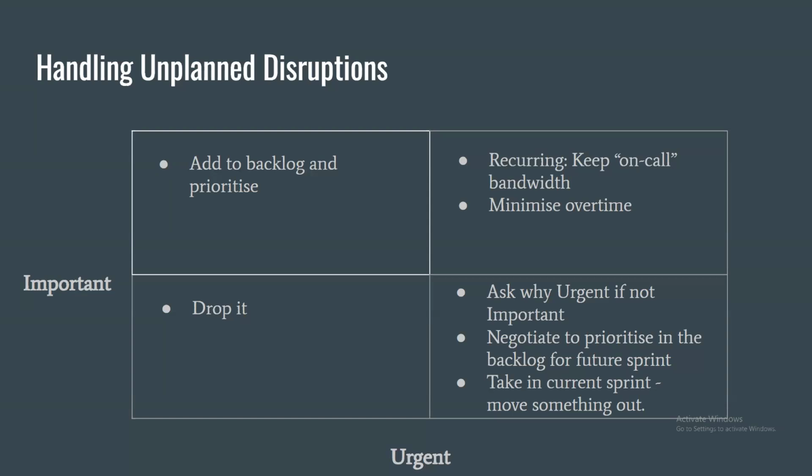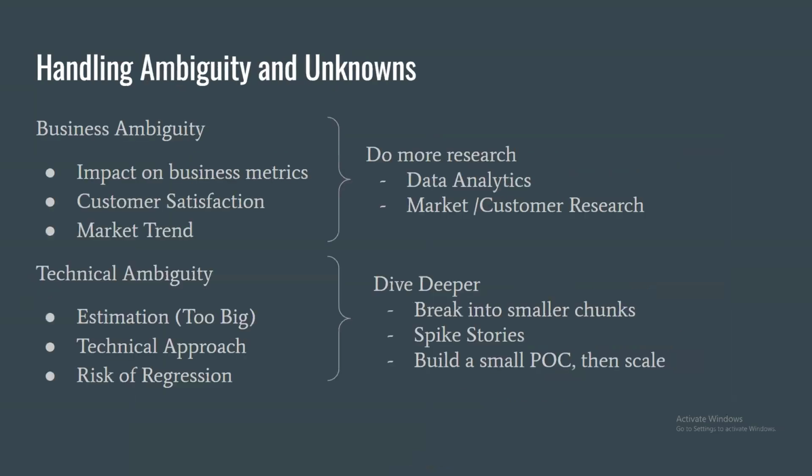I heard from my leaders that no change should be allowed without a value. So there should be a value or an outcome. Then only we should go ahead with any change. And that is one of the key principles of backlog grooming. When we add something to the backlog, the priority is decided based on the impact it creates. And if the impact is not clear, then the product owner has to do more research on what is the business impact created by this specific change.